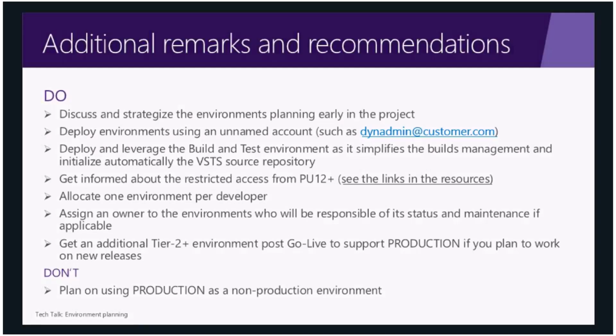So, some recommendations so that you can avoid issues that we've seen in the field. First of all, and I keep repeating myself, discuss and strategize the environments planning early in the project, and then revisit the environments plan at each key milestone.